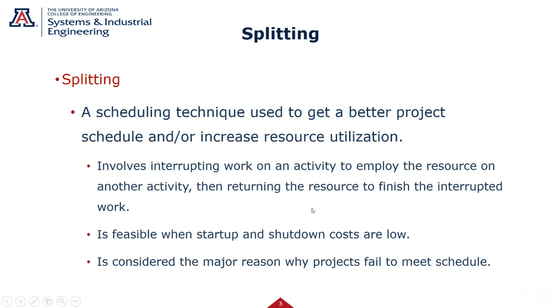You'll purposely start them because you have some people, knowing that you're going to stop them and then start them again later, and try to balance people that way. And you can do that. What I would probably recommend is, if you have a nice way of splitting that task up, actually make it two separate tasks so you can do it versus trying to split it this way. But I mean, you can do that.